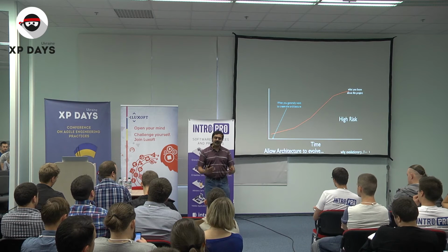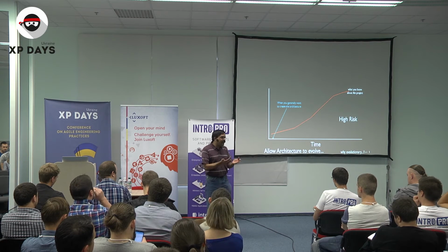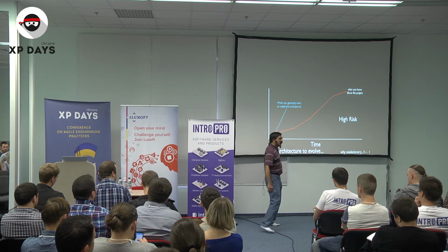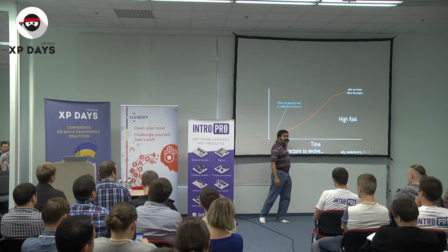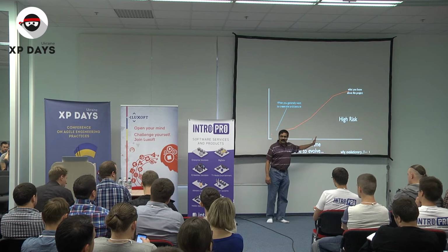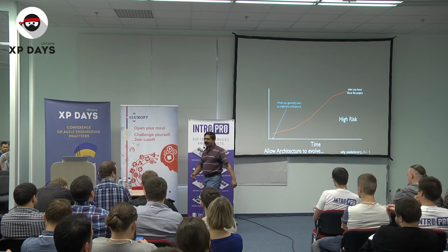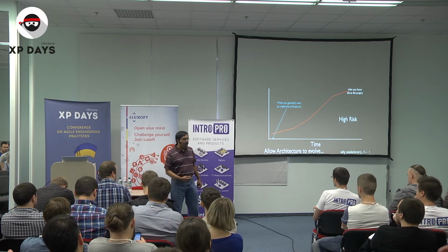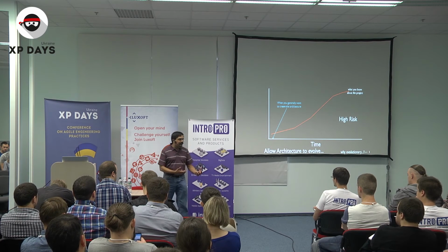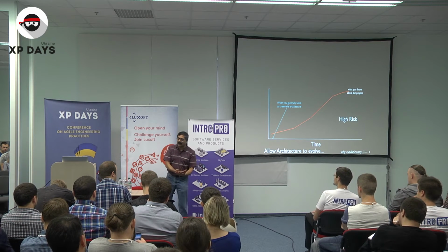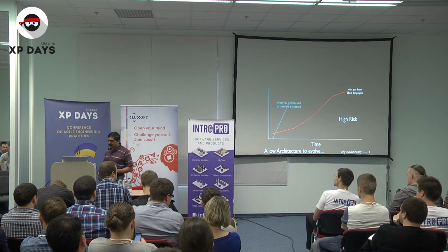I will foster the team to create the architecture, but we are only going to work on a draft for the first several sprints until we begin to really understand what we are actually building and how things begin to fall in place. So we should create an architecture draft, but not an architecture in the beginning, and we should start evolving it along the way.